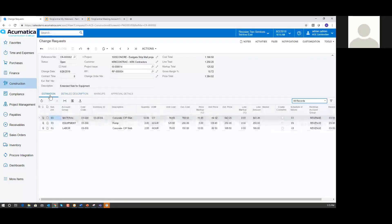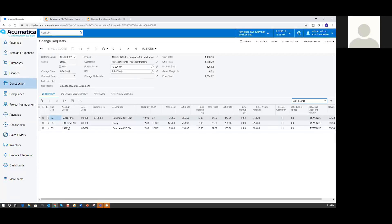If I go back to the Estimation tab, this is where I've got the details for the change request. Estimation covers the labor, material, and equipment — perhaps subcontract cost types — that I've pulled into this particular change request. I've got a material line item pulled from inventory, which is the actual concrete that's going to be utilized to create that slab. I've got equipment — my concrete pump — and then I've got some labor to handle that particular task. So I've pulled my material, equipment, and labor items right into this change request like a budget. I can see quantities, unit costs, extended costs, and I've added price markups to the material and the labor, along with unit price and extended price.